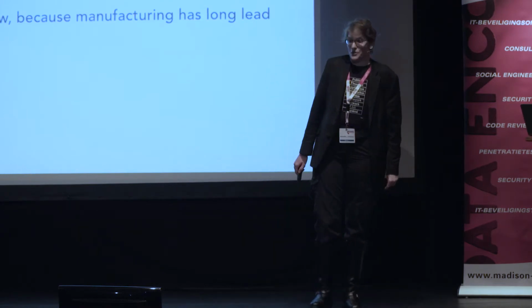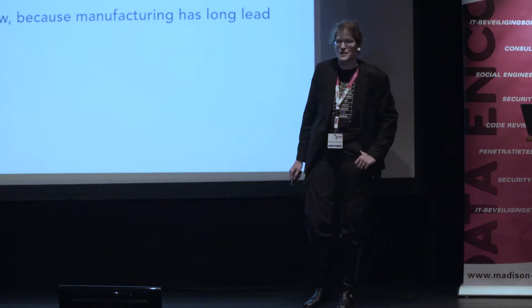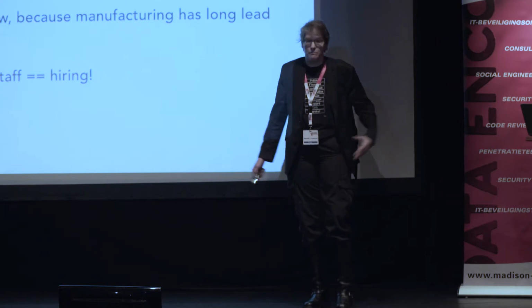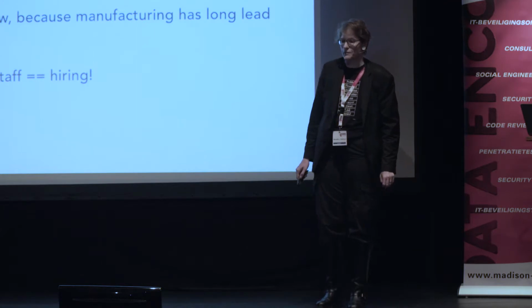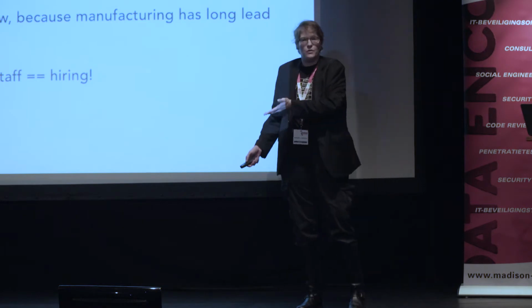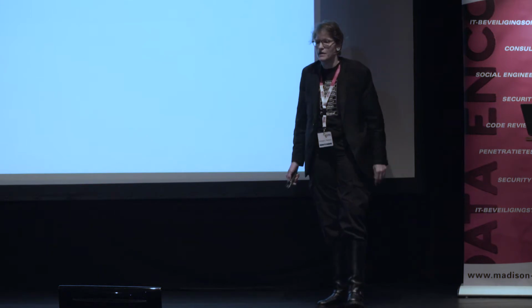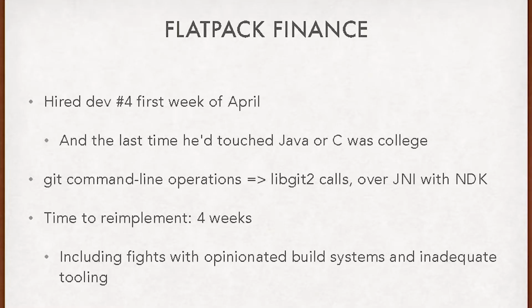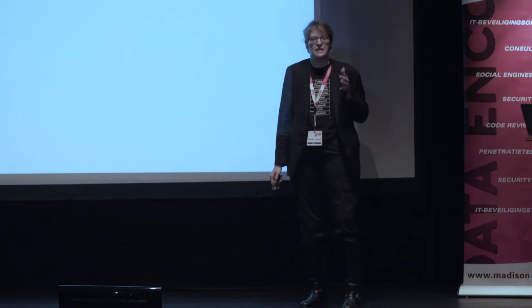We're also in the middle of a hardware purchase right now because it turns out that for smart cards, manufacturing has very long lead times. But because we got that second tranche of funding from the successful prototype, we hired more people, and that has enabled us to spread people out on independent tasks, such as some of the tasks in Flatpak. So we hired our fourth developer first week of April, basically after the planning phase was completely over. And the last time that this guy had touched Java or C was in college, and he had never touched the JNI.